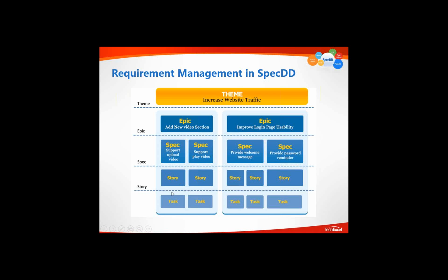But you do this time estimate based on the task, meaning one story might create multiple tasks. I think a better picture here is each story has 2 or 3 tasks instead of 1 to 1. Anyway, a story is broken into multiple tasks. The task represents the driving unit of an Agile team that will be used to drive the implementation effort so that the story becomes implemented to become the working software.